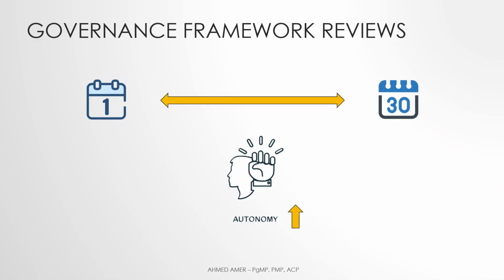Please note that program periodic health checks are used between decision point reviews to assess how well the program is performing and whether it's on track to realize and sustain its intended benefits. These reviews become especially important when there is a long time between planned decision point reviews.